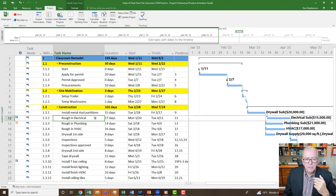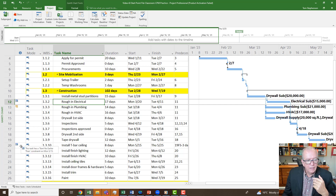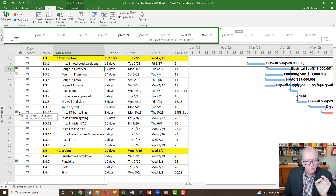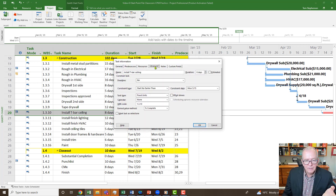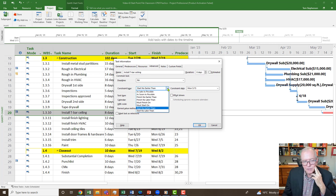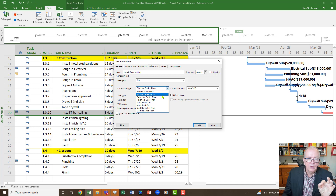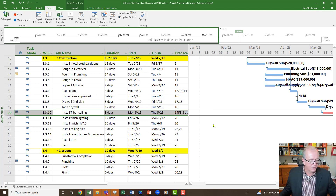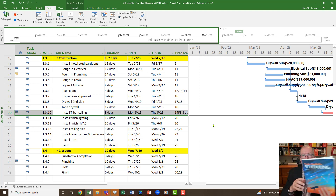More commonly, the problem is these little checkered boxes in the indicator column. These represent constraints — limitations you place on an activity. If I double-click on Install T-bar Ceiling and go to the Advanced tab, I can see the Constraint Type field with all the different types. 'As Soon As Possible' means no constraint from Microsoft Project's perspective when scheduling to a finish date — that's the default.